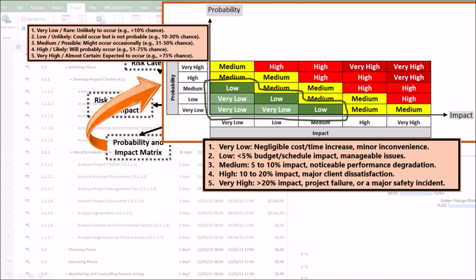Green zone, located in the lower left corner. This means that these are risks with low probability and low impact. They represent risks with potential events that have a low probability or minimal impact and do not require immediate action, but need to be monitored, usually in a watch list in the risk register. They represent a deliberate and calculated decision to accept the risk, since the cost of mitigation usually outweighs the potential impact.